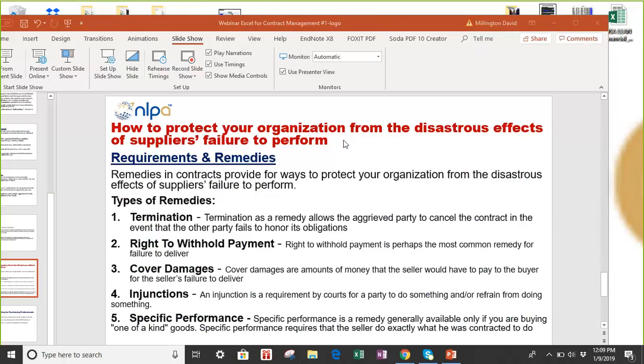And the ones that posed a high degree of risk, I told them, hey, we need to deploy immediate contingencies. And I gave them a period in which they had to improve their process. So we had immediate contingencies which helped, in the short term, to mitigate a lot of the historical risk that those suppliers posed to my organization. And I worked with their process improvement folks to improve their situation.